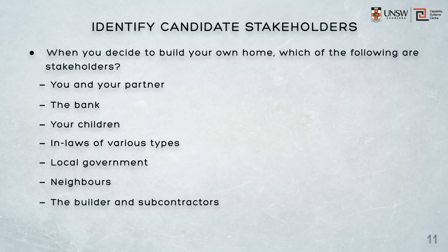Although, for example, you may be purchasing your home from a developer builder and you've arranged some form of discount on the purchase price in return for allowing the builder to use your home as a display home for a short period. In that case, the builder may become a stakeholder with limited rights because they've purchased those rights from you.